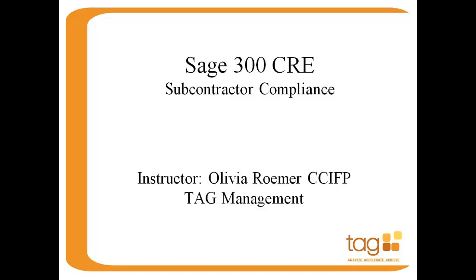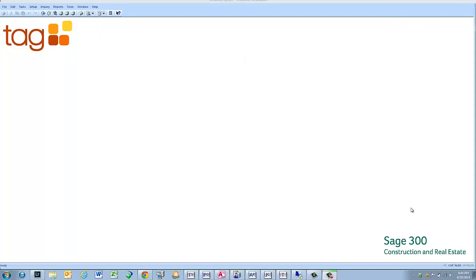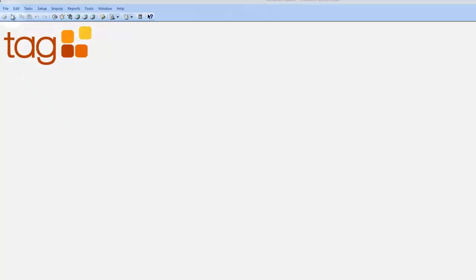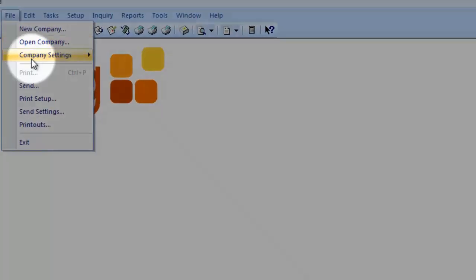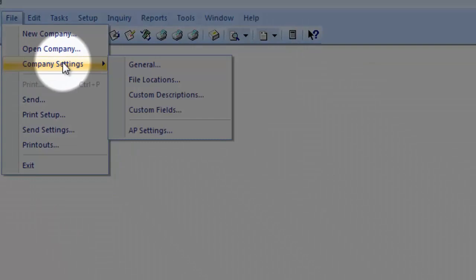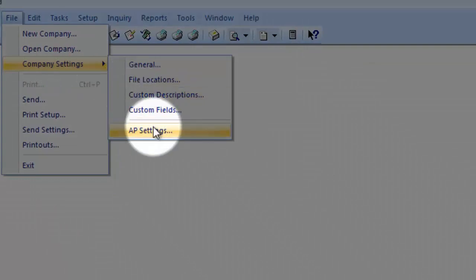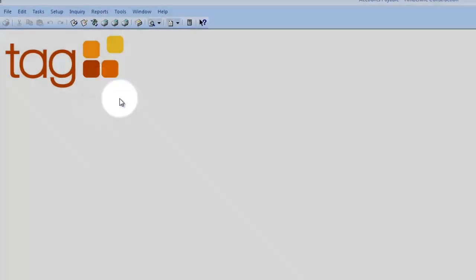Included in version 13.1 of Sage Construction and Real Estate, Sage added a new feature called Subcontractor Compliance. First you need to activate this feature within the software. To do so, you need to open up the Accounts Payable module, go to File, Company Settings, AP Settings.